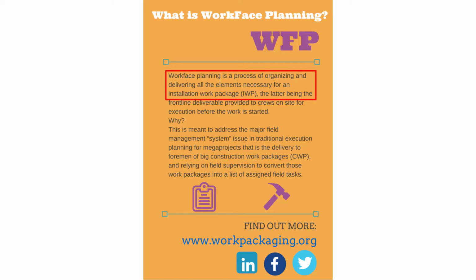Okay, so the definition of WorkFace planning is listed right here in the first sentence. WorkFace planning is a process of organizing and delivering all the elements necessary for an installation work package. Now, I did a little bit more reading on this website, and I was able to find one kind of sister website that had information. An installation work package is basically the way they're taking a large portion of the project and they're chunking it down into smaller portions that they can go into detailed planning on.